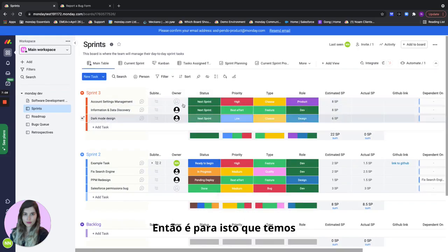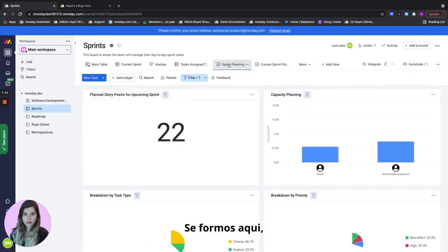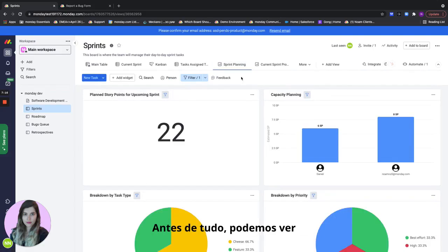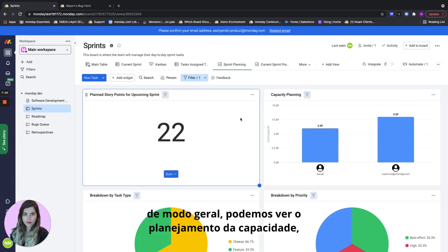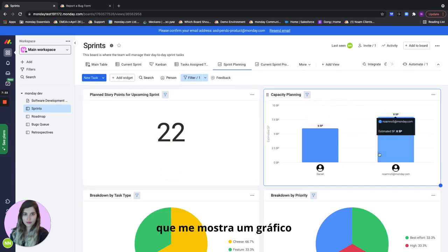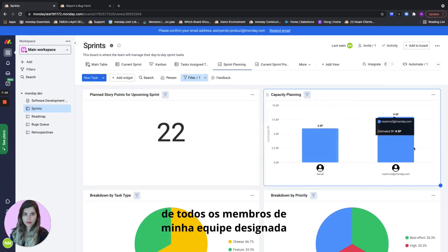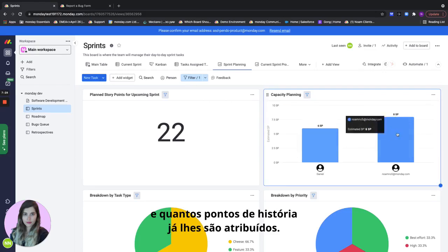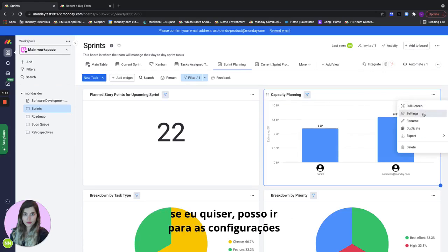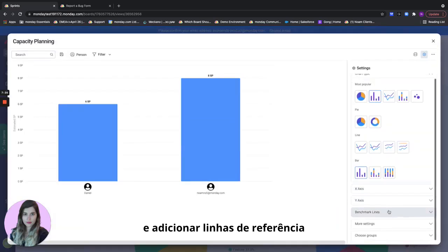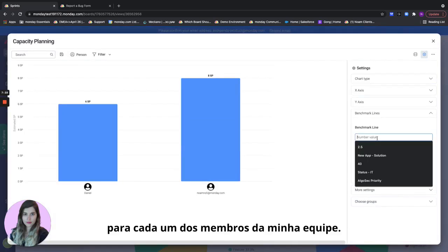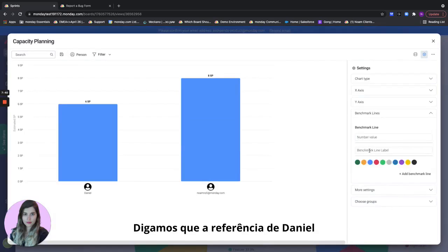This is what we have our sprint planning dashboard for. If we go here we see a bunch of very useful information. First of all we can see the planned story points for the upcoming sprint. Overall we can see the capacity planning which shows me a chart of all of my assigned team members and how many story points I've already assigned to them. What I can also do in here if I would like I can go to the settings and actually add benchmark lines for each of my team members.